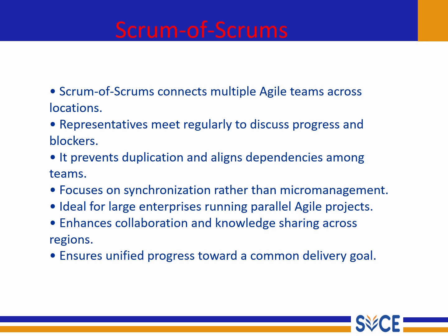Its representatives meet regularly to discuss progress and blockers. Only one member from each team attends to share the important updates. It prevents duplication and aligns dependencies among the teams. This ensures that two teams don't work on the same task by mistake.